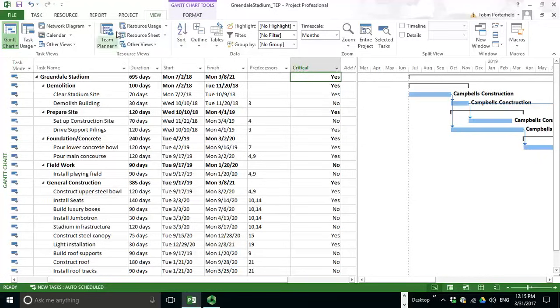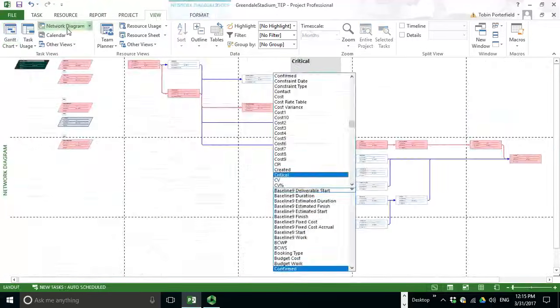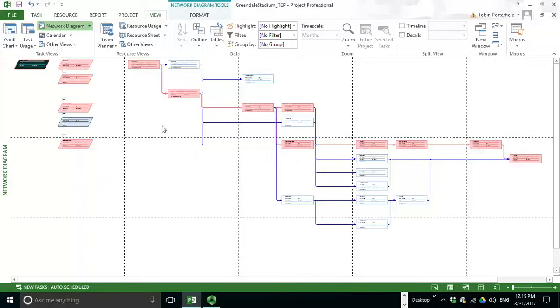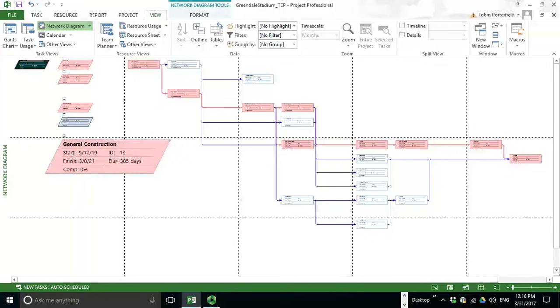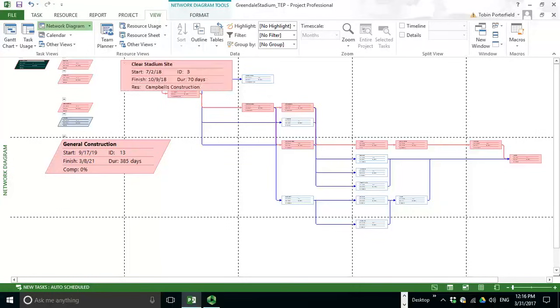Another way to do this more visually is to click on your view tab at the top and then choose network diagram. Your critical path will appear as the pink activities. And again, these are the summary activities. So they'll also be pink if some activity within that chain is critical. But what we're really interested in most cases are these.